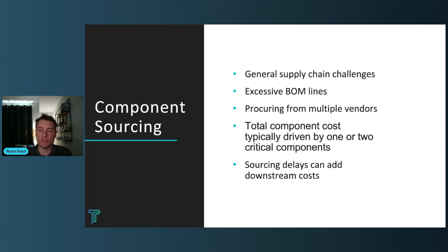Meaning if your material can't all be received at once and some of your material is going to have to be warehoused for weeks or months in advance, or there's confusion about when you're going to be kit clear and your whole schedule gets blown up, and then you have to pay to expedite, you're trying to recoup your schedule in manufacturing. This is a very common problem that you can avoid if you get ahead of your sourcing on your components.